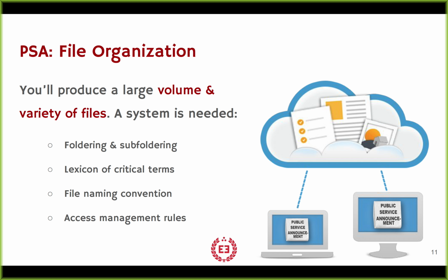I encourage you to look into the use of foldering and subfoldering. You can do that by the steps, by the stages, by the milestones, by the tasks. You need a lexicon of critical terms. I'm trying to utilize those right now when I talk about the steps versus the stages versus the milestones versus the tasks. That way, if I tell Adam that he's the DRI over this task, he immediately knows that that task is a subcomponent of a milestone that is a subcomponent of a stage, which is a subcomponent of a step.